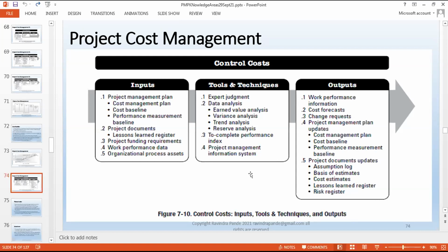And on top of that, I do have a performance measurement baseline where I normally try to understand, on each and every resource basis, man, material, machine, whether the resources' performance is up to the mark or not. This is again checked against estimated versus actual. So the variance between estimated and actual gives me the performance measurements. And that's how I build a performance measurement baseline across the group of tasks to understand how I am doing at a particular activity level, work item level, and so on and so forth.